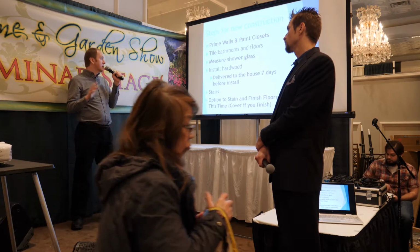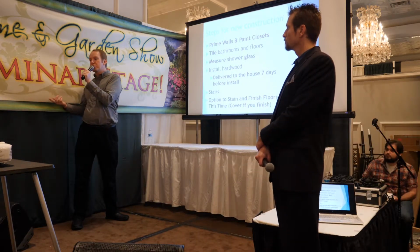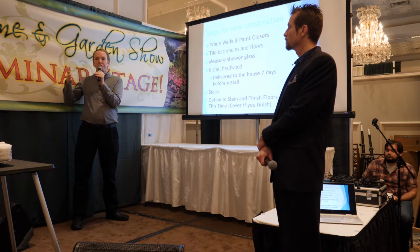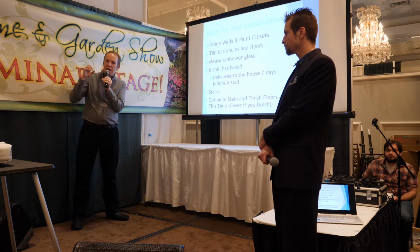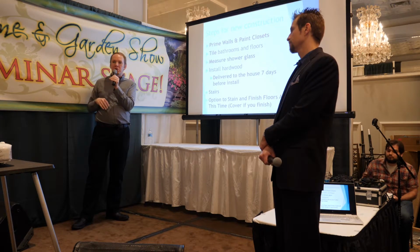We recommend a minimum of 7 days, but it may be upwards of 2 weeks. And the wider the wood you use, like if you do a 5-inch plank or a 6-inch plank, you want it to acclimate a little bit longer.